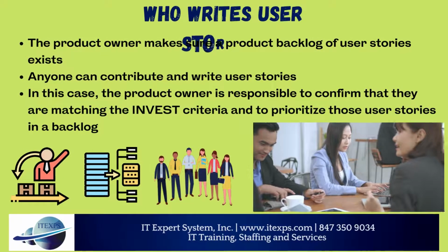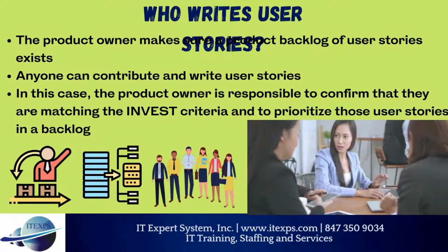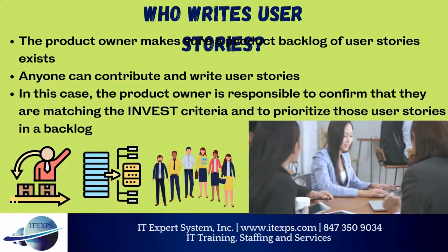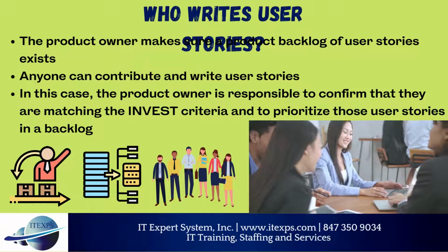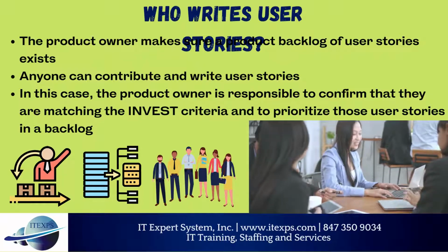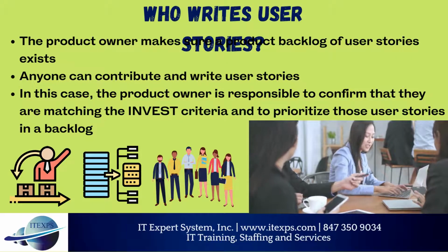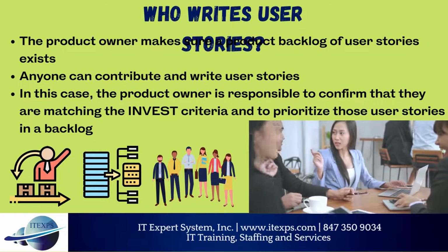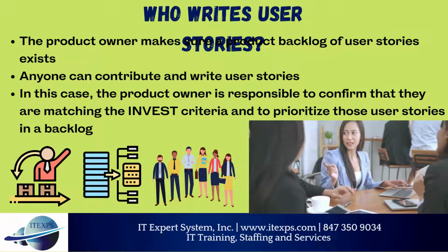Now, let's discuss who writes the user stories. The product owner has the responsibility to make sure a product backlog of user stories exists, however it doesn't mean that the product owner is the one who creates user stories. The more people join in the conversation, the better, and anyone can contribute and write user stories. In this case, the product owner is responsible to confirm that they are matching the INVEST criteria, and to prioritize those user stories in the backlog.